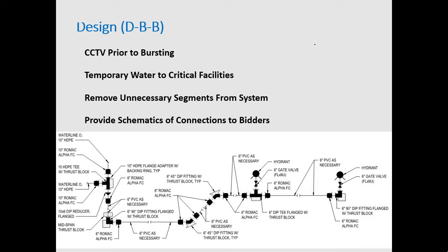One thing the owner wasn't used to seeing was the bottom schematic, giving them what parts and pieces. We did this for every one of our connections. There are 4 pages at the back that just have schematics. It's easier for the contractor to go through and take his bill of materials off of this without putting the onus on the designer to do it. Here's our schematic. You may change it.